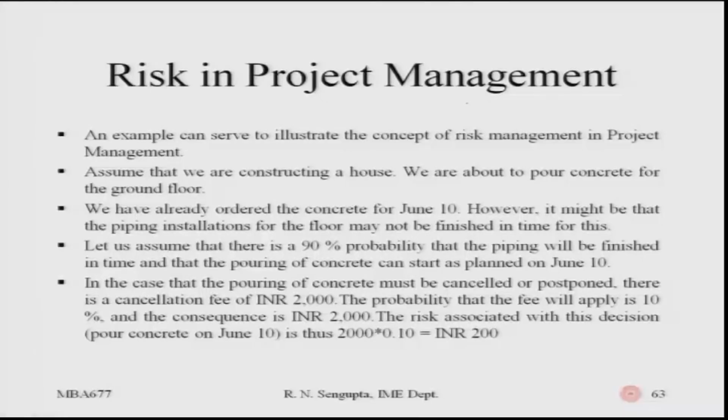So, let me very briefly give you an idea of how dependence and independence will come into the picture, considering that all my students are decently aware of how the expected value, the covariances, and the standard deviations are calculated. So, see for example, if I consider the 1 day cost as 2000, this is not an exact problem, but I am trying to expand the thought process of the students so that they can appreciate how the calculations would be taken up later on. So, it was 2000 multiplied by the probability Pi of failing, which was 10%. Now, see for example, if the number of days was, say, di, considering there are 10 days.